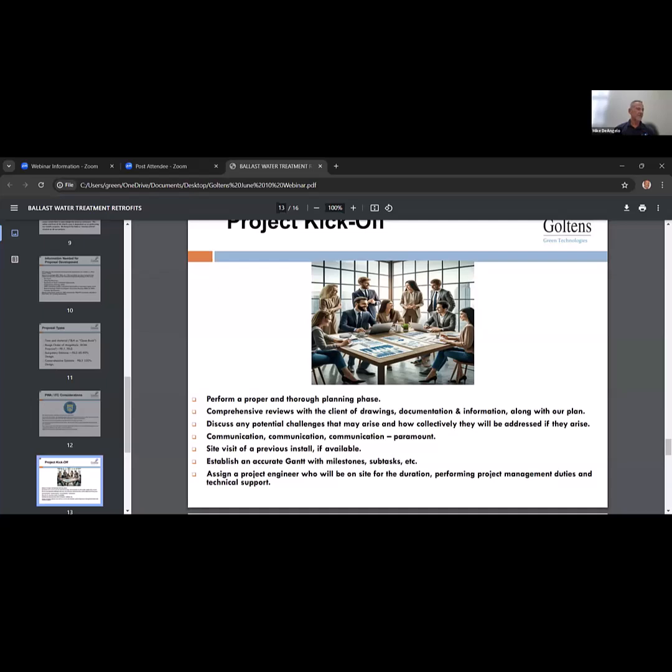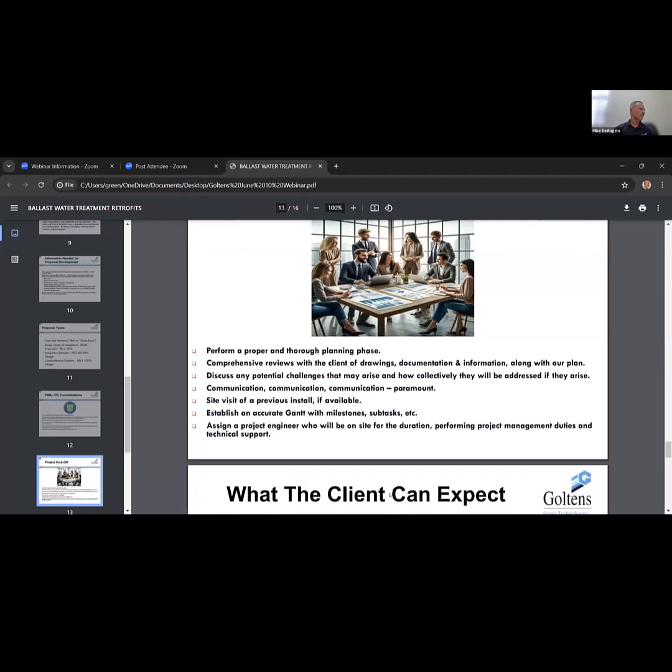Communication, communication, communication. I say that three times because that is paramount in our world. Effective communication for us is the only way to get something done and done properly. We like to perform a site visit of a previous install if available. We like to establish an accurate Gantt chart with milestones, subtasks, etc. And we will assign a project engineer who will be on site for the duration, performing project management duties and technical support. Next slide, please.